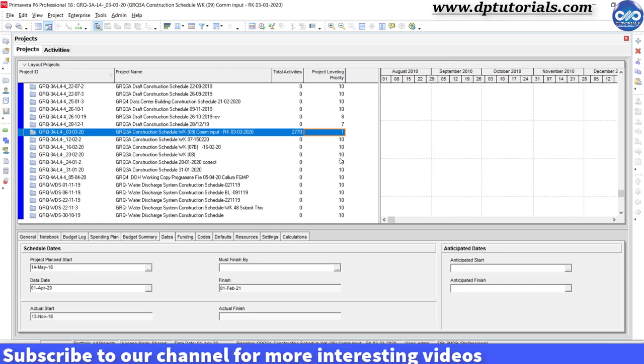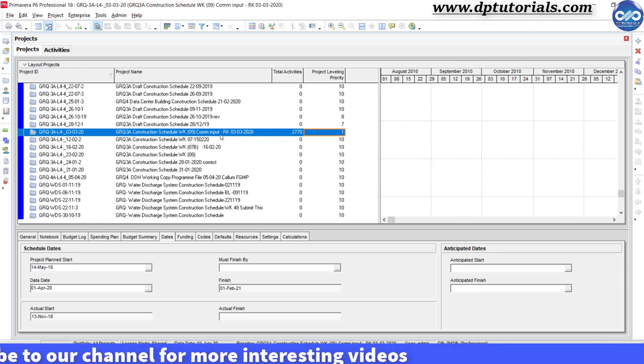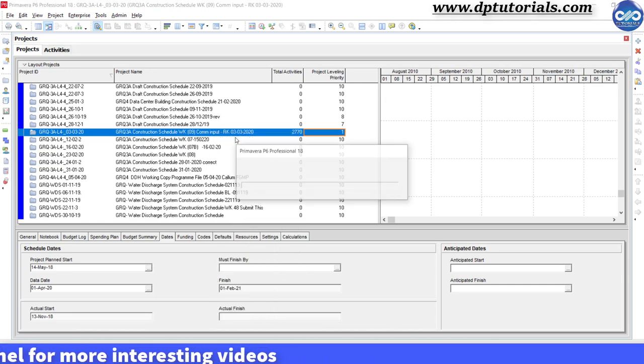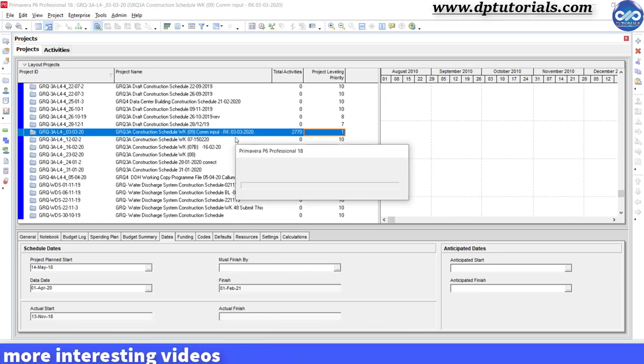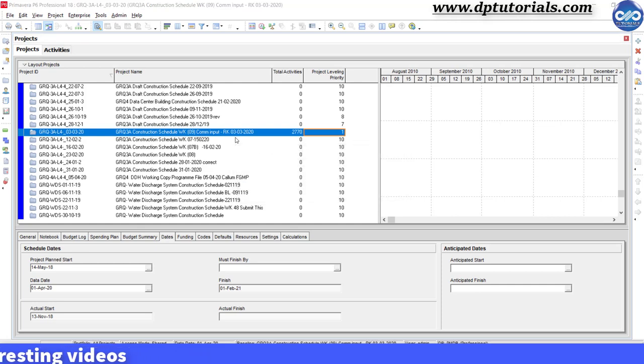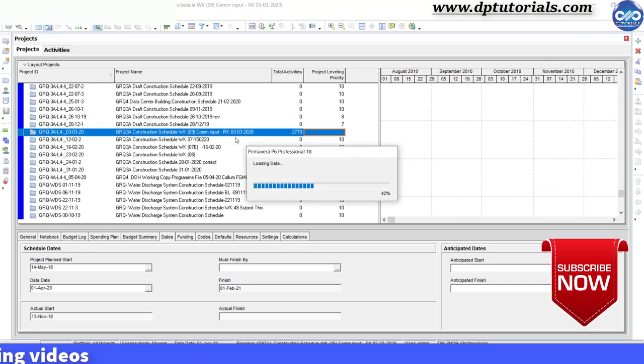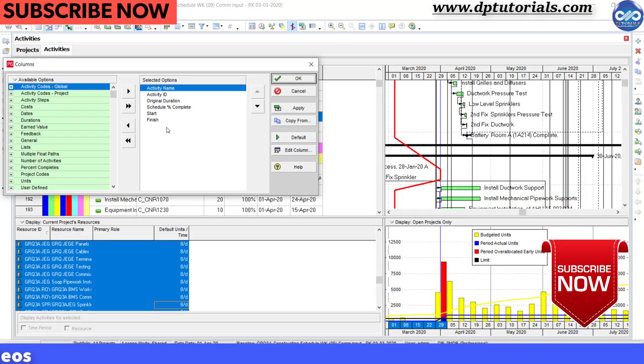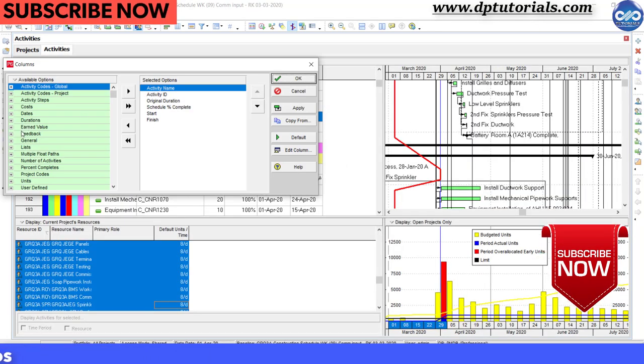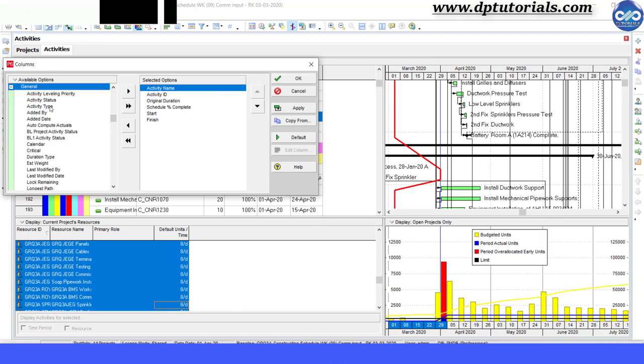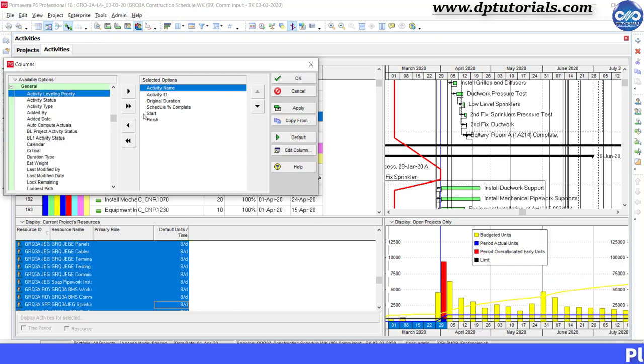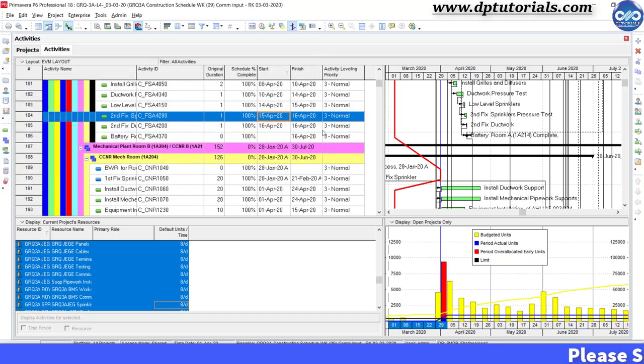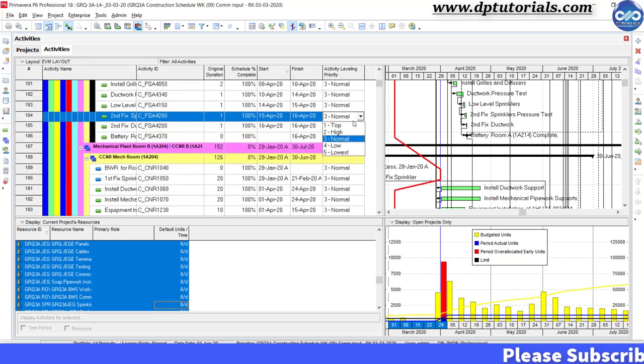Now let us open this particular schedule and set activity level priorities. Similarly, right click, go to Columns, and in the general tab select activity leveling priority to add it to the visible columns on the right side.